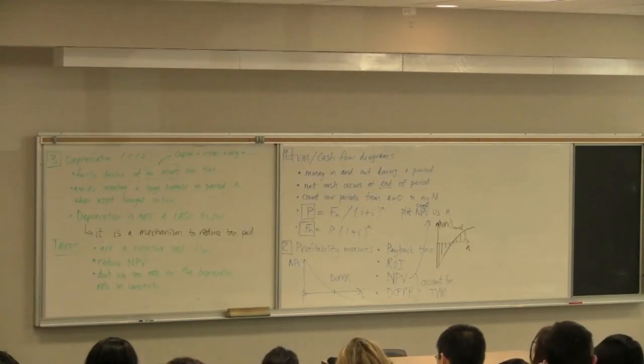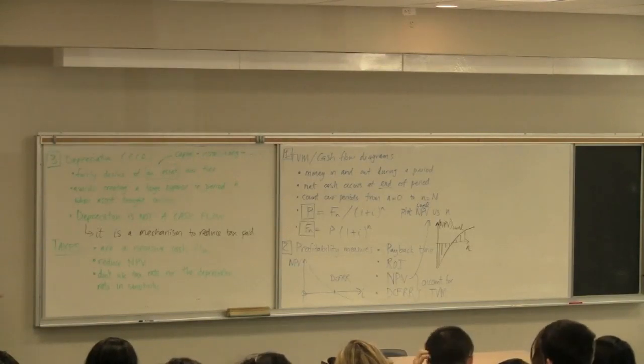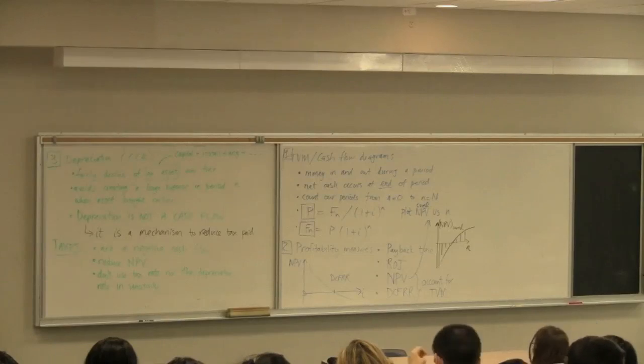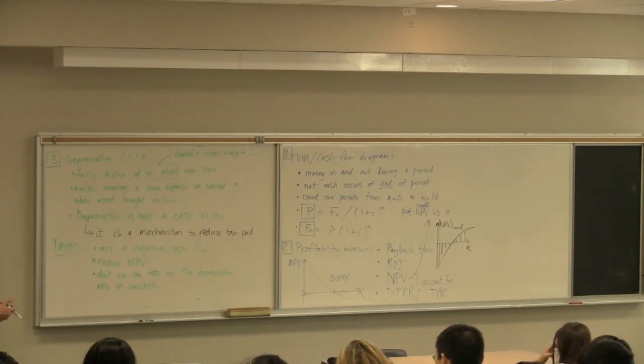Percentage throughput that your plant will be operating at. Like in the Brazil example in assignment 5, you build your plant for 10,000 tons per year, but you're only starting it at 7,000. So you start at a lower rate, and that may just be because it's your best guess of what the market's going to be able to handle. But that 7,000 could be lower, it could be higher, depending on when you actually start to build and operate the plant. You may discover that the market for that product is smaller or greater than anticipated. So that number would be something that goes in the sensitivity analysis.